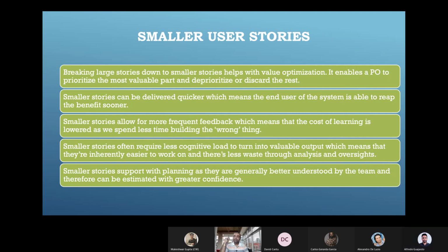But here you can see, the moment you say to the product owner, "Okay, I am done, I am completed," the next thing the product owner will ask is, can we make it live? Then you say, no, the automation test cases have to be updated and then I need to run those cases. The CI/CD is not implemented. It's not like that. When the PO says okay, done, it means everything is completed for that story, including CI/CD, automation, all regression, everything.